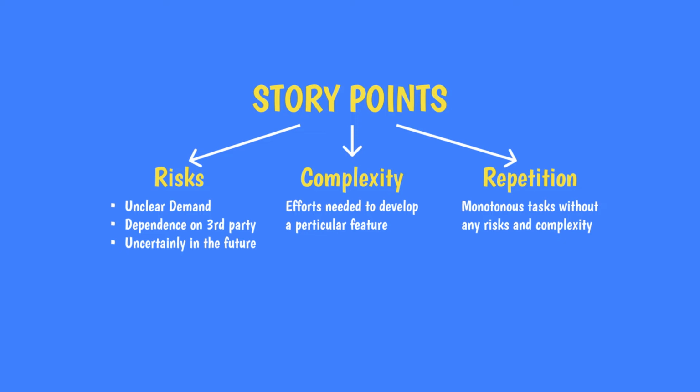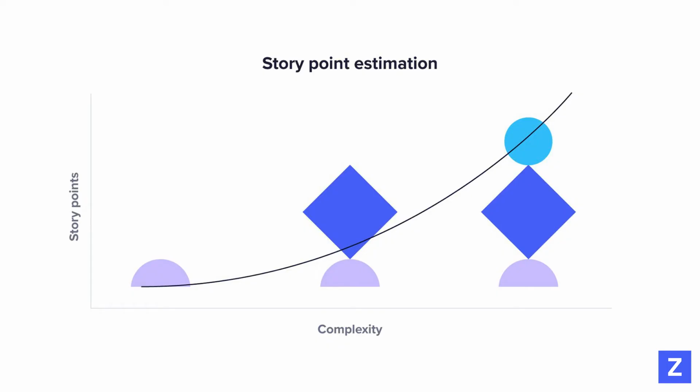This helps with estimating the amount of work we can do within a sprint and helps collect data to better plan future sprints. Points can mean different things to different people. While estimating points, we assign a point value to each task. Relative values are more important than the raw values. For example, a task that is assigned 2 points should be twice as much as a task that is assigned 1 point. When scoping, it's good to consider the amount of work it would take to finish it, the complexity, risk or any uncertainty while doing the task, and then of course the time and duration. Because it's relative, it can take some time to get used to the point system.